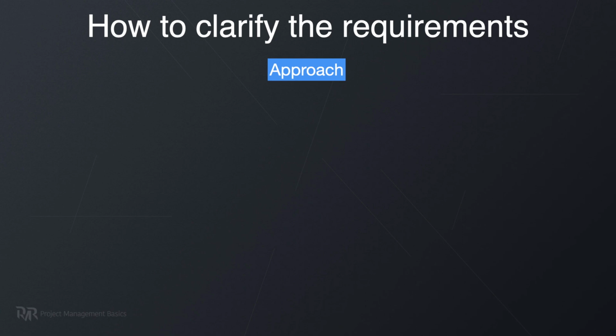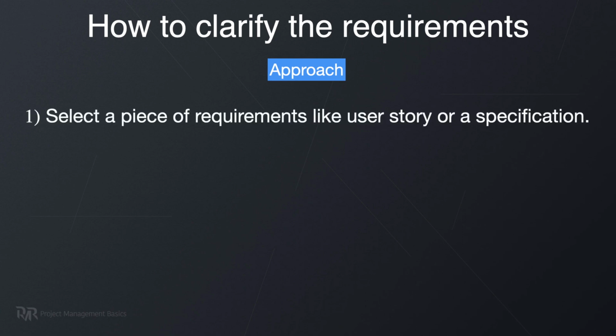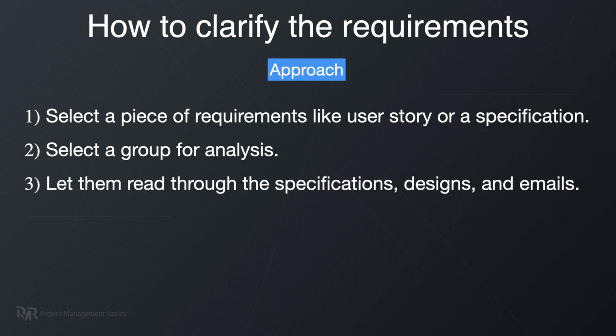So here's what you need to do in practice. Select a piece of requirements like a user story or a specification. Then select a group to analyze it. It's either the whole team or just group leaders. And then let them read through specifications and review designs.